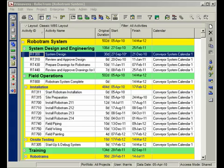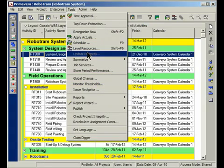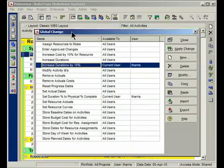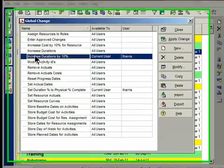Now, a word of caution. Global Changes make changes to your project that can't be undone with the undo feature. So you want to be careful with what you're doing. So here we go. First, we're going to bring up the Global Change window under the Tools menu and here we go.